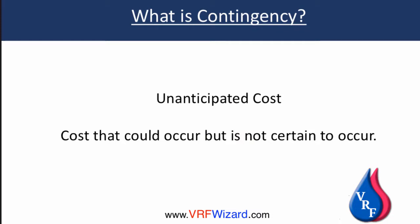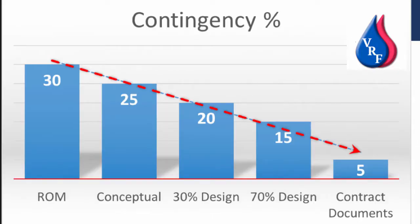So what is a contingency? Basically it's an unanticipated cost — a cost that could occur but is not certain to occur. During the design phase you could have a ROM estimate, which is a rough order of magnitude, so the contingency is going to be high on that. For projects that are in their conceptual stage of development, you can expect to have a higher contingency factor than that of a fully designed contract document set.